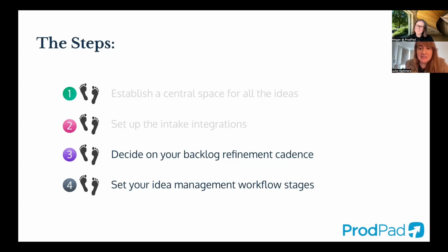And then lastly, setting your workflow stages. Like I said before, this should make sense for your team and your process. They should include maybe things like discovery or design, ready for dev, or parking lot. And it should reflect how your team actually works, not some kind of idealized double diamond process on the full workflow. Keep it simple and evolve it. See where the pain points are before you add more stages.